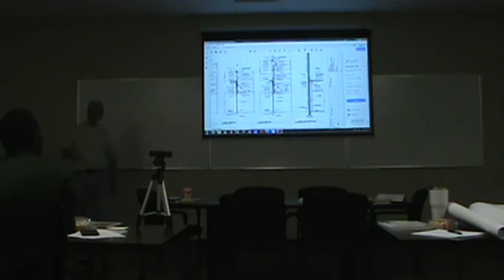Our next critical path was not EIFS, was it? It was electrical. 25 days was electrical. That's critical path. So that takes us up to 11/25 for electrical. Everything else pulls along with it. Then we had finishes, which I don't even think we put time on, but just for the sake of our example here, let's say that takes another 15 days.